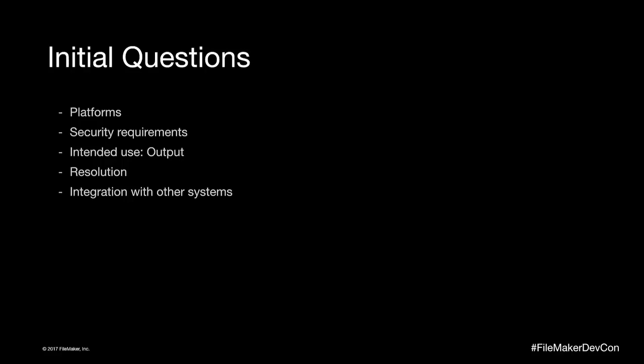All these things you have to take into consideration when you're thinking about how much time you're going to invest. Integration with other systems. Has anybody worked with a plugin or an API or anything in this room? How many of you found it easy to integrate with the plugin? Okay, see, it seems easy, right? And then you get in there and you're like, ah! So you have to think about that. And those actually probably can take more time than actual coding sometimes.